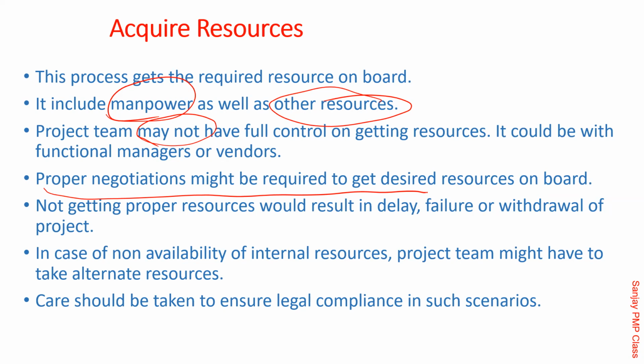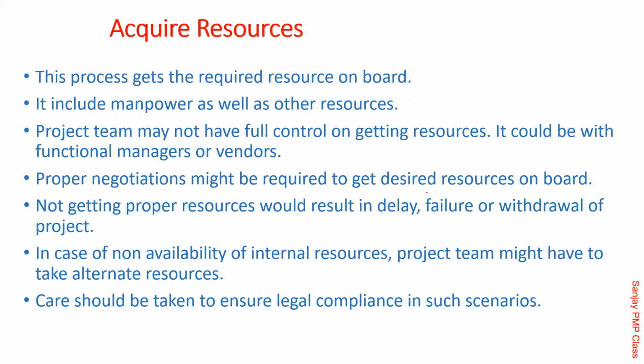In the projectized organization, while you seem to be very powerful, people are worried about what they will do at the end of the project. Projects are temporary, functions or departments are ongoing. In a functional organization, those resources are not much worried. The day Abhishek's project gets over, I will go back to the functional manager and he will give me something new. But in a projectized organization, people worry about what they will do after this. What will I get? So those are the advantages versus disadvantages of functional and projectized.